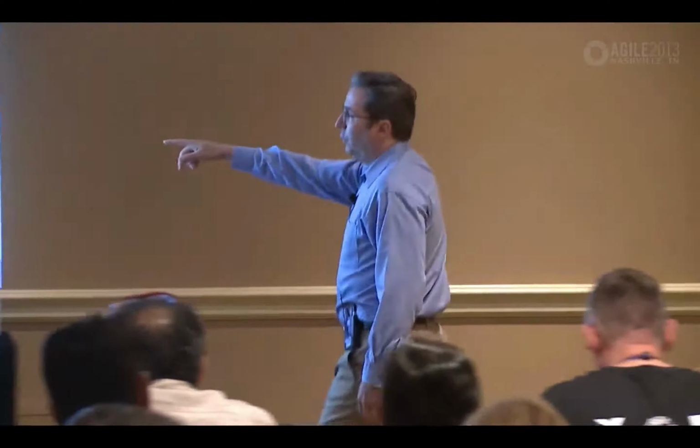It has features in it. So that product backlog in the upper left has features. Now, let's say that we have created component teams. That's how we chose to structure our system, which means a feature out of that backlog might span 3 component areas. So what do we have to do? You have to take the feature out of the product backlog. You then have to split it into its constituent component pieces, and you have to farm those out to the individual backlogs for the component teams. The nomenclature is like component area number 3 product backlog. Okay, fair enough. So what happens?